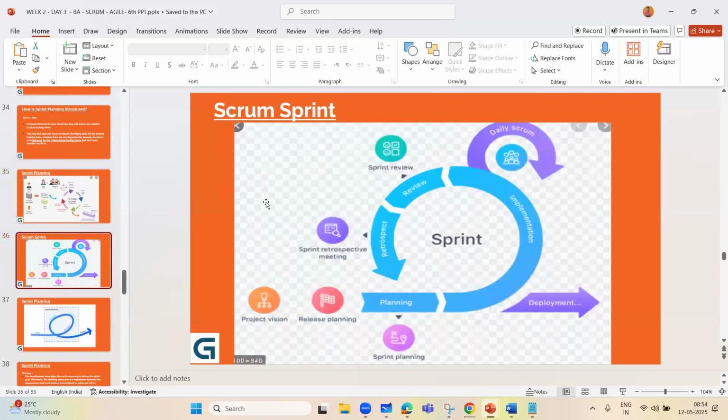Now, the customer gives you the project vision and shares how frequently he wants the releases to happen. Accordingly, you define the sprint backlog and take a few items for the sprint planning meeting. You start implementing and meet everyone regularly in the daily stand-up or scrum meeting. Then one fine day you realize the work is done, and you invite the customer for their review.